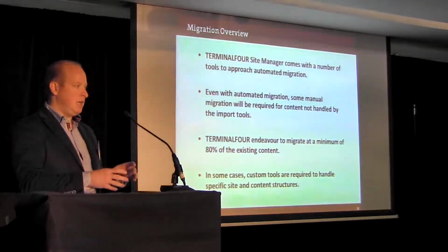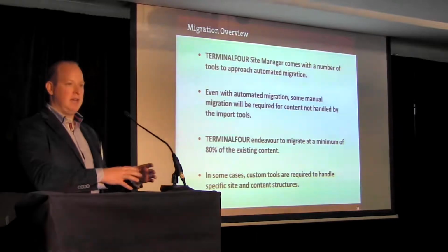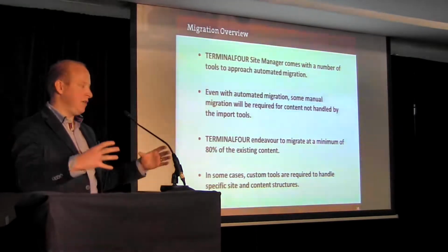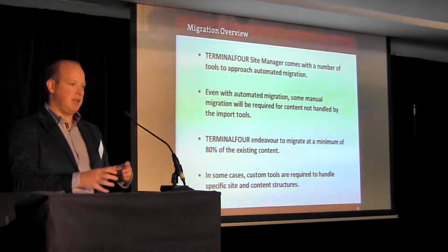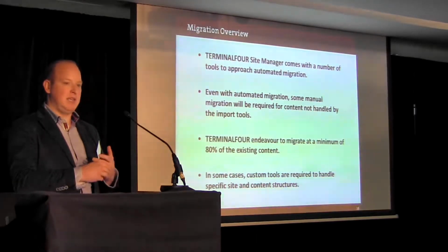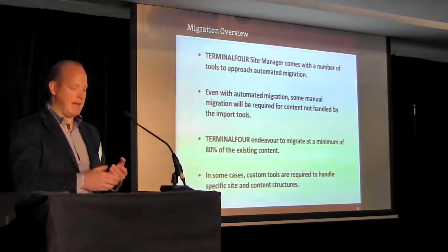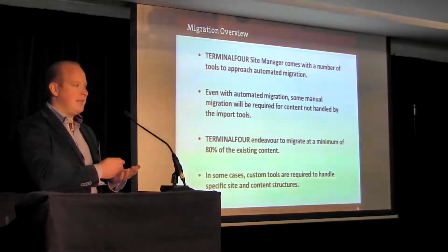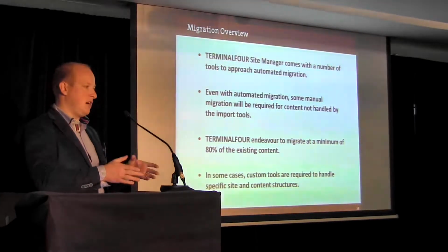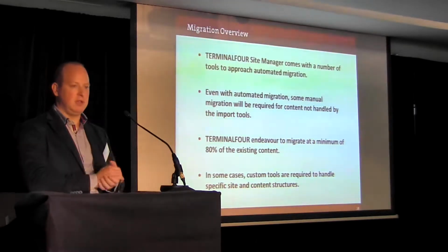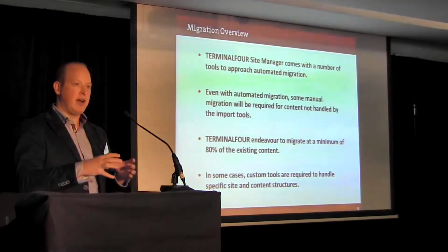Typically, originally it was the big bang approach. We had to grab everything at once and bring it into Site Manager, and that poses its own problems in that, if something goes wrong, you go back to the start and you basically do everything again. So what we've been looking at is how we can break it down. You can target departments, you can target schools, you can target smaller areas and bring them in.